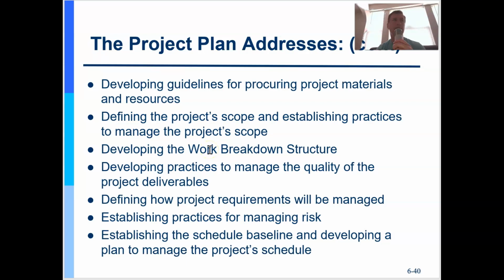That details your scope, and it gives you a basis for determining the activities in the schedule, and it gives you, in the boxes that make up the work breakdown structure, a way to accumulate the actual costs that you're developing. And this work breakdown structure and tools like it are really key to managing risk, minimizing risk.